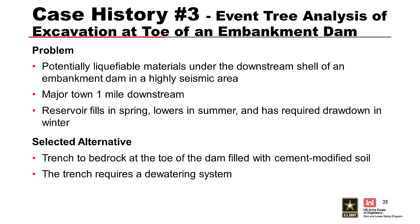Case history number three provides an example of how a quantitative event tree analysis was used to help decision-makers plan the construction schedule to reduce risk. For this project, potential liquefiable materials existed underneath the downstream shell of an existing embankment dam in a highly seismic area, with a major town located about a mile downstream that would be severely inundated if the dam failed. The reservoir typically goes through three annual stages: filling during spring runoff (March to June), lowering during irrigation and summer water use season (July through October), and drawn down during the winter flood season (November through February).